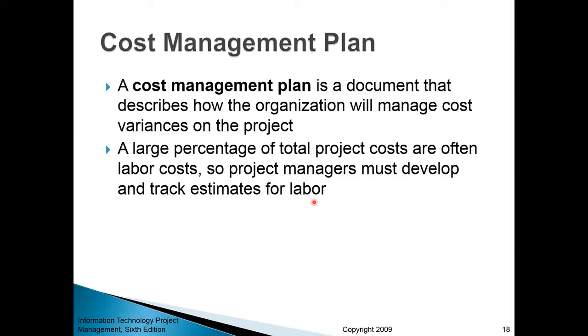Also, something that needs to be done to manage cost is to prepare the so-called cost management plan. It's a document that describes how the organization will manage cost variances on the project. Cost variances are unavoidable. Nobody can predict future cost with 100% precision.